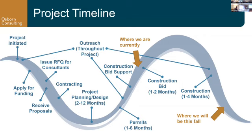And then yeah, once we have the plans, we started doing the permitting phase and then finalizing the plans. We've got the construction bids for. And we're trying to go to bid in the next week or so after the board meeting approves all of the spec package that I just showed you guys. So we're hoping to be done with this fall, and maybe POCD can share some photos of how it went. It is the first one of the 10, so it is kind of a learning lesson on all the different things, and then it should be very smooth going forward with the following 9.